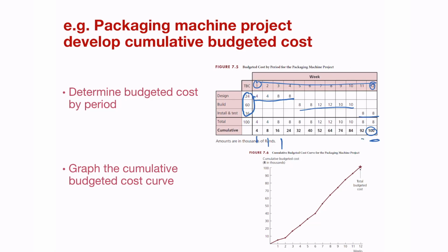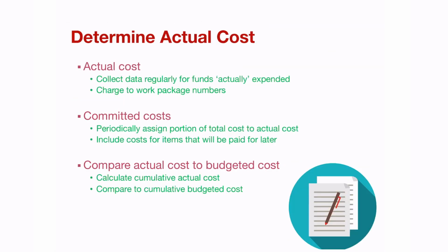So you can have a phased budget table, and you can also have a cumulative graph, which is what I call a snake graph, which essentially just runs as a cumulative number over time. In the control section in the previous chapter, we talked about control and making sure that all of the actuals and all of the different activities are captured each week. Every time there's a change, all of those activities need to be captured.